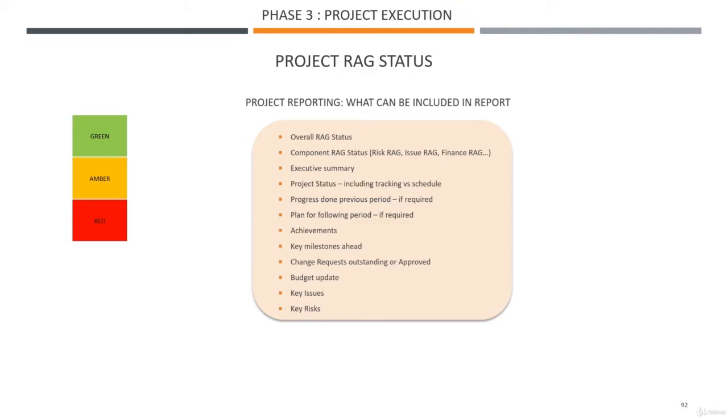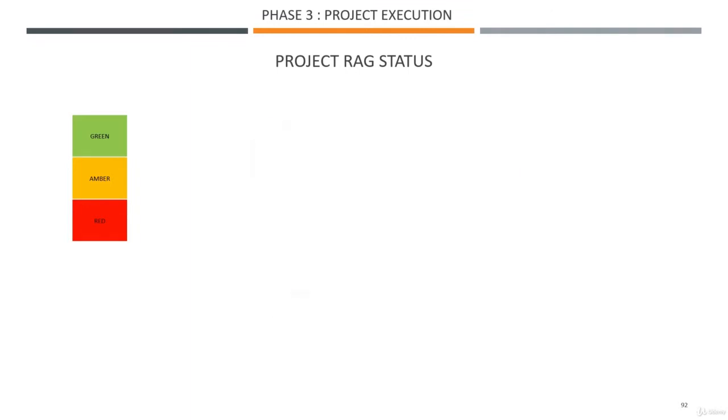Sometimes executives have to go through 20, 30 projects and I see this project, green, green, green, green, green. I don't even have to review them. This one, amber, ooh, start to have a look at, and red. So you probably guessed that green is good and red is not good. So there's no clear standard. Sometimes when you come into a company, they already have their own standards. They will say green means that you have this, amber means that you have that, red means something else.